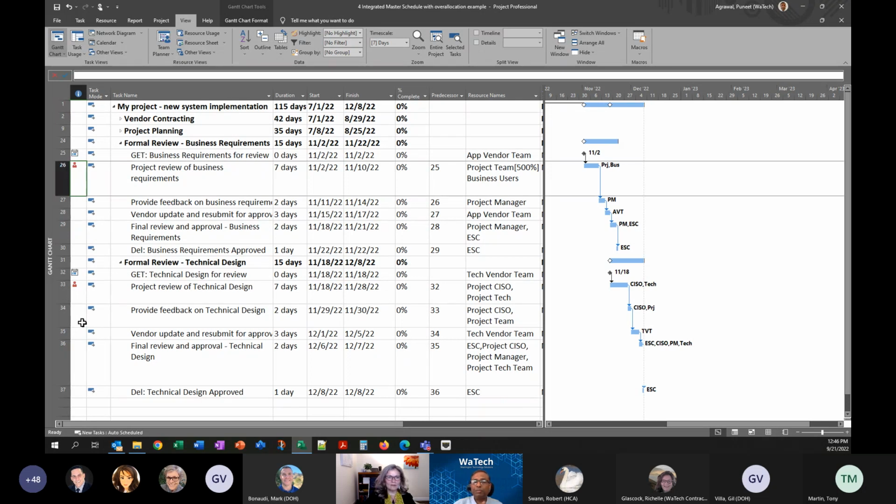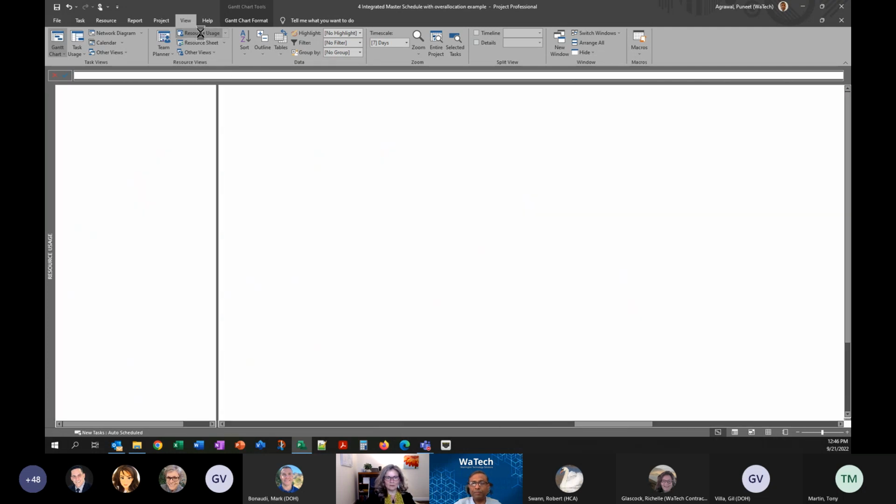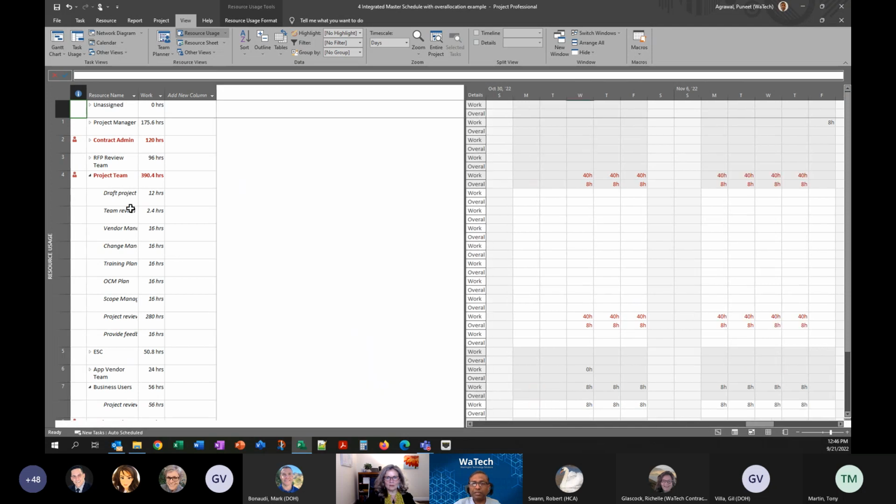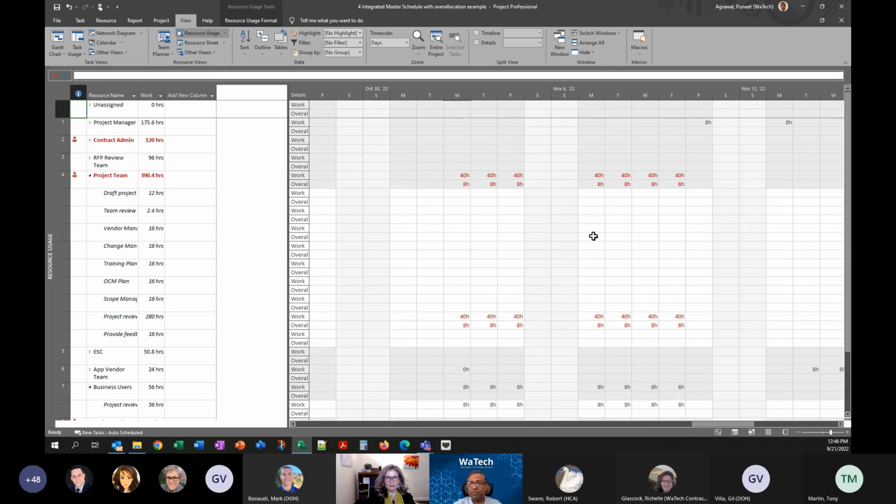Again, you can be using any tool, any mechanism of comparing hours available versus hours assigned. Here, we are using this tool which shows the red indicator, which means there is an over allocation. To see the over allocation, I can go to a resource usage tab or view. And as I expand the resource and the task and the available dates that this person is assigned to, it will start narrowing down to somewhere towards the late October, early November timeframe.